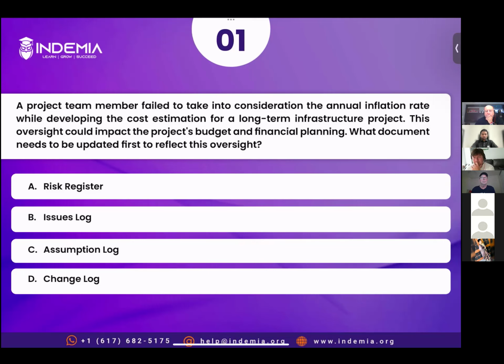things that we assume during the planning, those are called project assumptions. So for example, what is an assumption? Assumptions are the basis on which you plan something, right? So for example, inflation, whether it is 10% or 15%, let's suppose I assume inflation would be 10%. So this is an assumption, right? Even if I do not include this in my plan, still it is an assumption, right?